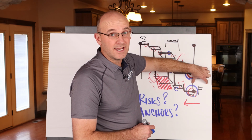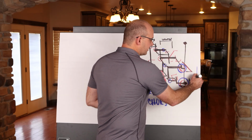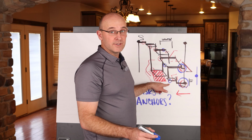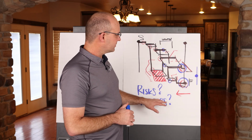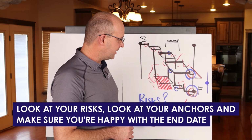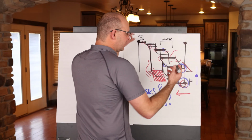Okay, well, why did it happen? Do you need to add 3 months to the overall duration of the project and the target, or do you feel like these risk mitigation strategies have taken out that variability, right? That risk. So when you're done and you have your structure, you've analyzed your zoning, you know you have enough buffers, you know you don't have overruns, look at your risks, look at your anchors, and make sure you're happy with this end date. Once you are, this is where the magic comes in.